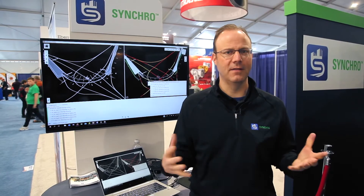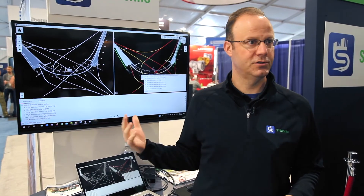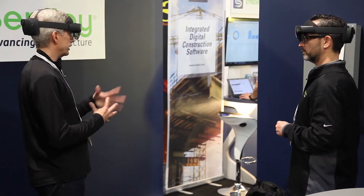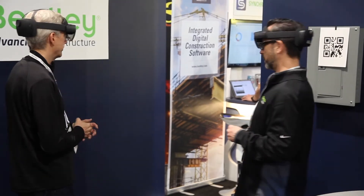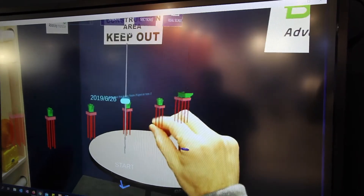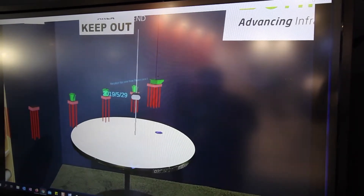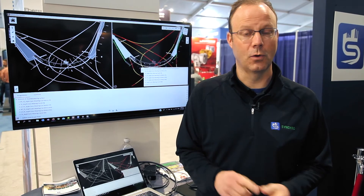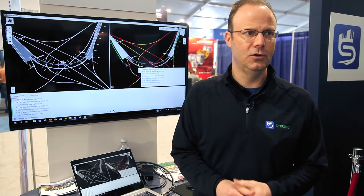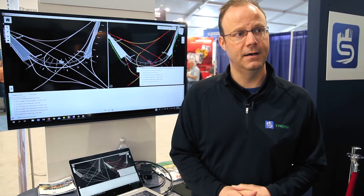Synchro is basically Bentley's new brand for our construction offerings — a full portfolio going from pre-construction planning all the way through construction operations and closeout. What we're seeing here is part of that portfolio called Synchro 4D, which takes design engineering models and turns them into a construction model. That means splitting the model up into constructable components to apply construction data to: work breakdown structures, schedules, tasks, and resources.